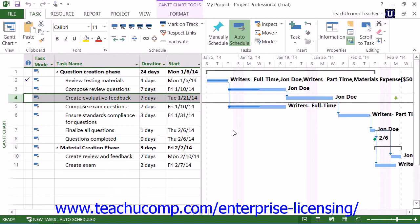A better way to set deadlines for tasks is to simply set a deadline date for a task and then use the default as soon as possible constraint. This way, Project can reschedule the task with the greatest flexibility, and you will also be able to view the deadline date for the task within the Gantt chart.